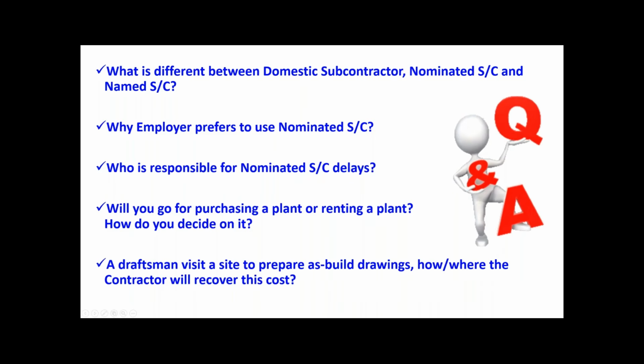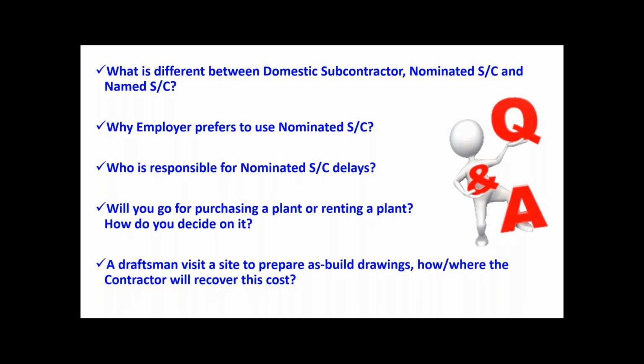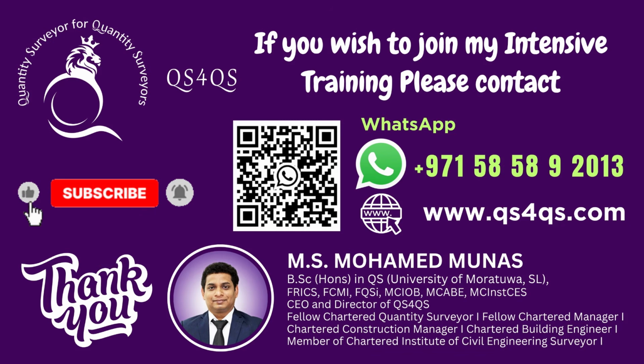Okay, can you answer the simple question? A draftsman visits a site to prepare as-built drawings. How or where will the contractor recover this cost? I need a little bit precise answer. The general answer is under preliminaries, but if you are saying more precise, it's under the general overhead.